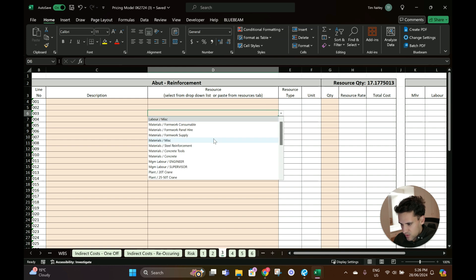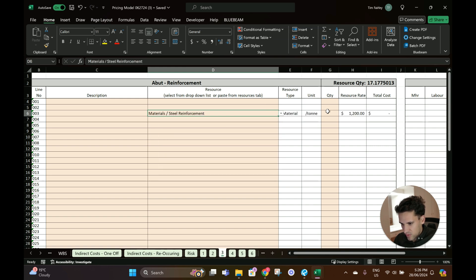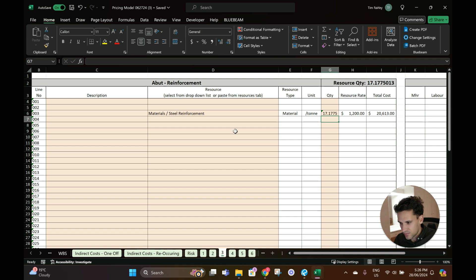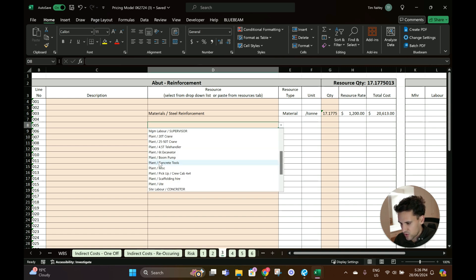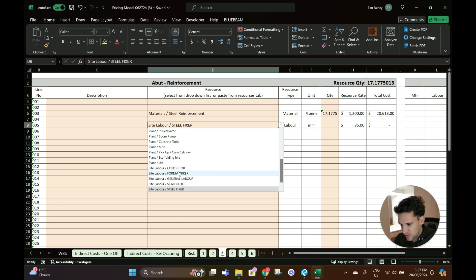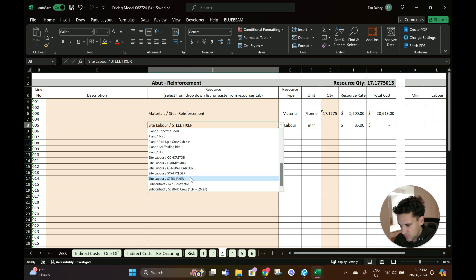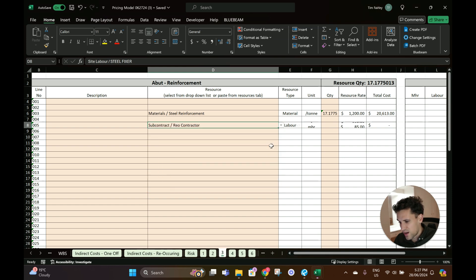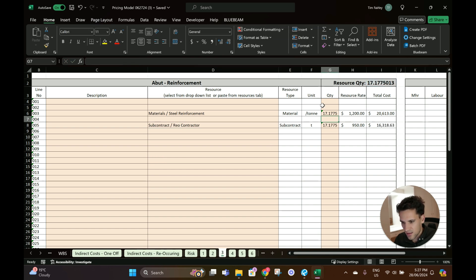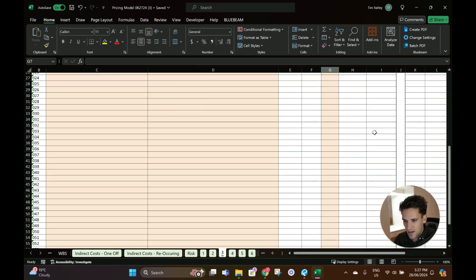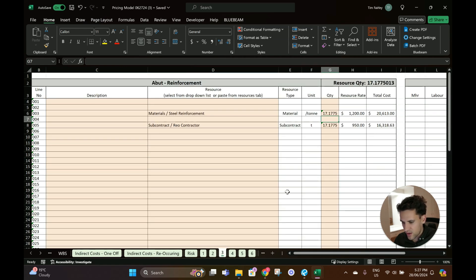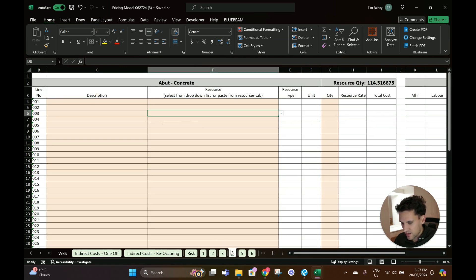Materials steel reinforcement, $1,200 a tonne. We'll just use a subcontractor for steel fixing. We got a rate from a subcontractor of $950 a tonne. There we go, $36,000 for that.